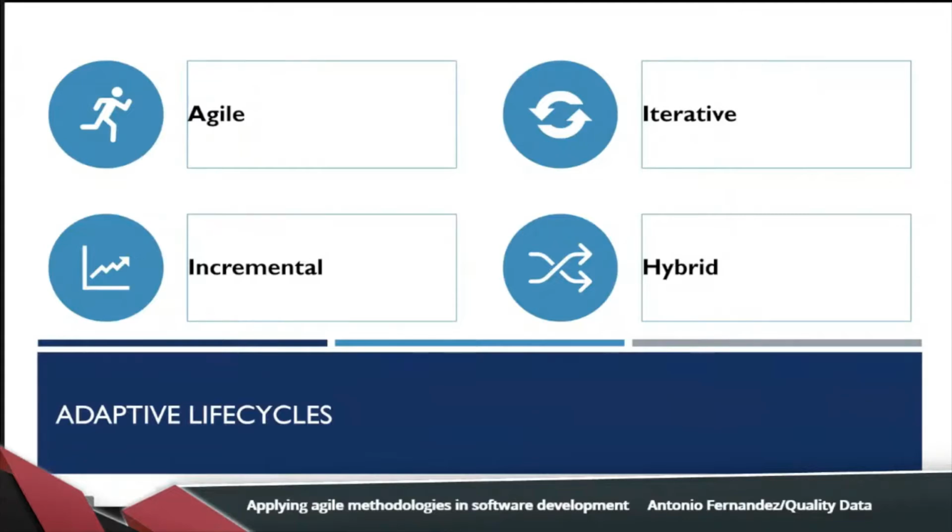Another example can be if I have a building company and I need to build a house for our client. I can divide this project into 2 phases. First, the design. We can create the blueprints and the render or 3D model of the house to obtain feedback from the client who will live in the house. After finishing this agile and iterative process in the first phase of the project, we can begin using a waterfall approach for the construction of the house.